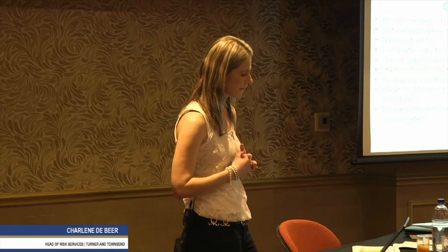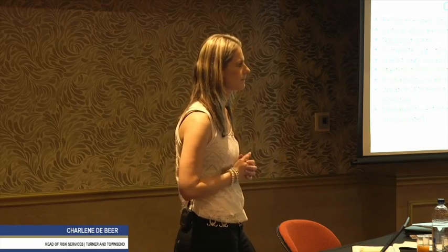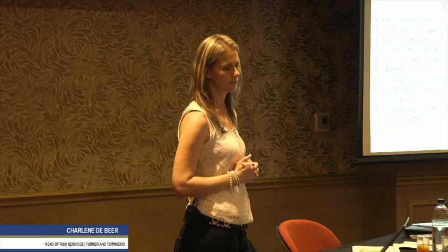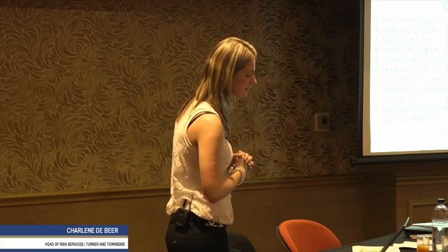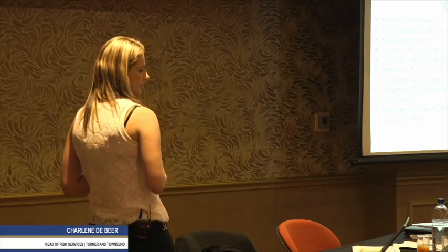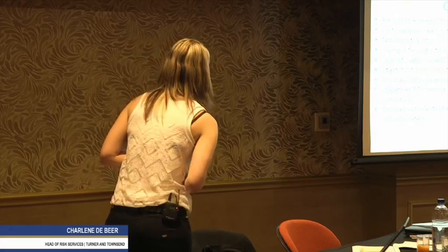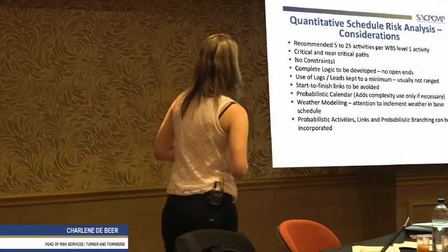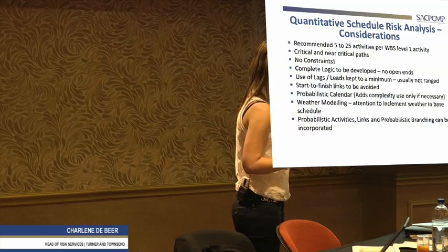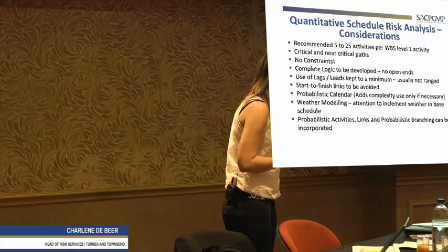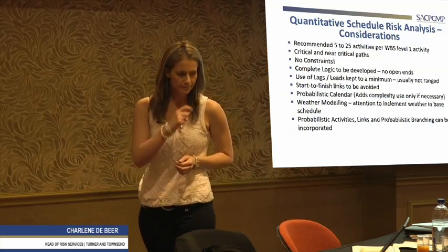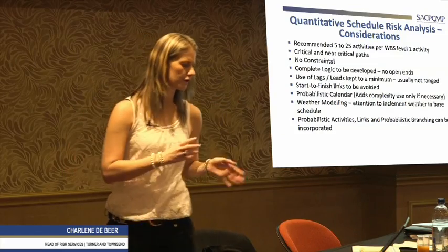There must be no constraints, or else you won't get a very accurate simulation in your schedule risk analysis. And they say complete logic to be developed, and that's what I said earlier on, no open-ended activities. And then use of lags or leads kept to a minimum, and it's usually not ranged. We say start to finish links to be avoided.